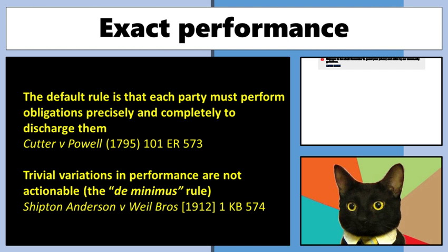And so there wasn't a term stipulated in his contract as to what would happen in terms of him dying. And so the widow, got the executor of the estate to try and sue the shipping company and say, look, the guy performed almost all of the contract. And the courts actually said no. This was a contract that had to be completed in entirety.